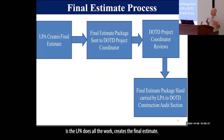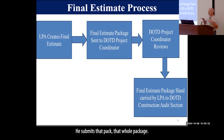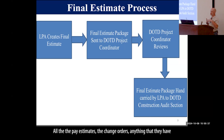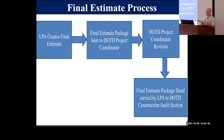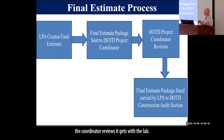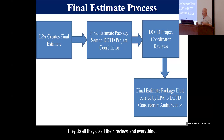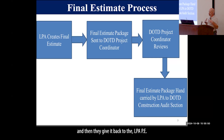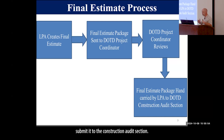How it works is the LPA does all the work, creates the final estimate, and submits that whole package — the 2059, all the pay estimates, the change orders, anything that they have collected — to the project coordinator. The coordinator reviews it, gets with the lab, they do all their reviews, and then give it back to the LPA PE. Then they submit it, or the CEI submits it, to the construction and audit section.